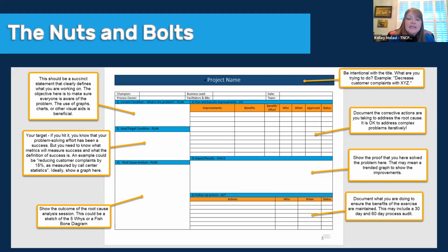I recommend a team of around 5 to 7, definitely no more than 10. Anything more than around 7, and you start to lose subject matter expertise. So make sure you're getting a team that are true subject matter experts, but you want to also make sure that you are working with somebody who can make decisions. So that might be the process owner who you're going to present this to. They might be able to make decisions.